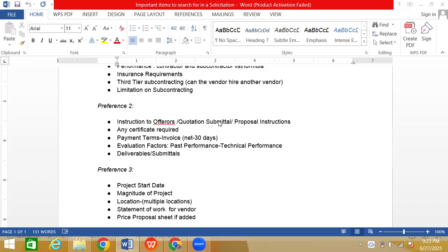That is exactly why we take multiple quotes from different vendors so that we have an option there. What if one company is asking for a 50% deposit, whereas the other company is not asking for anything at all? Or another company is asking for a lower deposit and even their estimate is good. Okay? So everything depends on the total cost. If it is lower, we go with the lower company and then we negotiate everything with them. But we do not skip the negotiation part with other vendors. Okay, so that we can have a backup all the time.